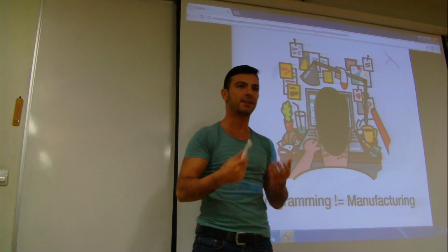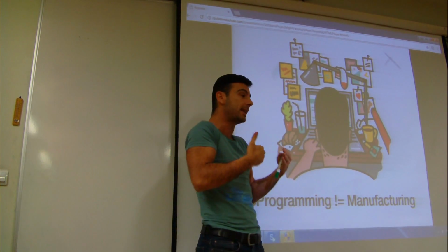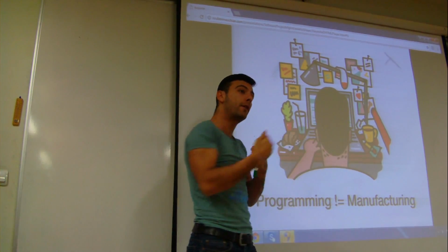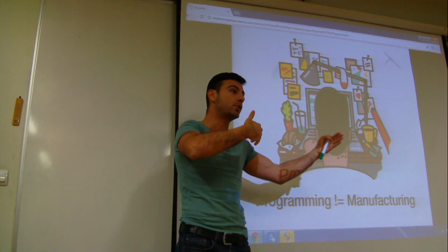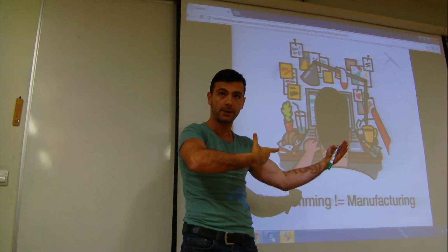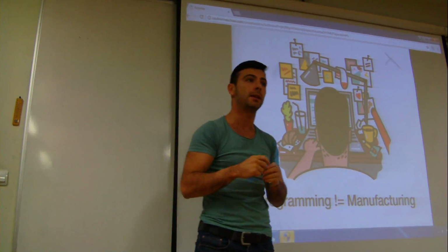This is why making estimations in programming is so difficult. Because an engineer at the beginning can't tell all the steps that they're going to take to the end. Furthermore, you don't know the number of steps, so you don't know the percentage of completion. Make sense? So, this is one of the things that makes it so difficult to estimate in engineering.